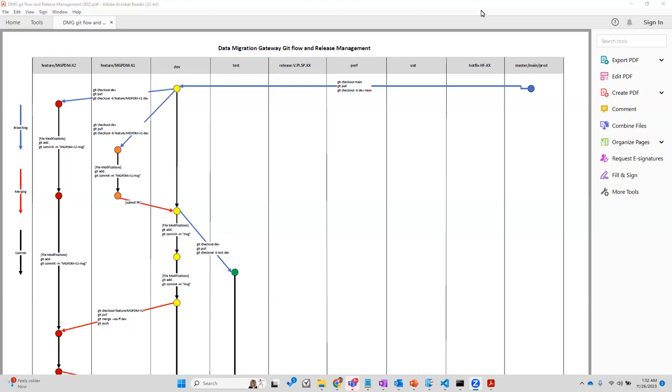Modernization. Program is modernization of analytical platform. Project is retail analytics. Within this program, there are program increments implemented. Okay, one program increment is of 3 months, one quarter basically. Okay. Within that, there will be sprints.